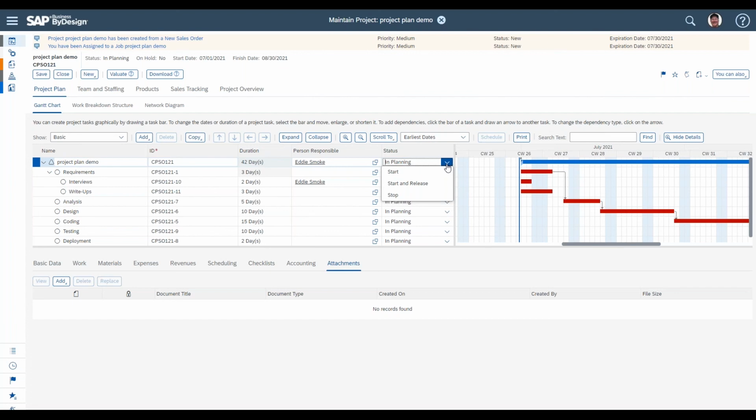Now, started essentially takes the project and locks in the project code itself and makes the project aware to the rest of the system from a finance perspective, but not an execution perspective. The release is where it does the full, let finances know, and when I say finances, I mean the other modules in the system.